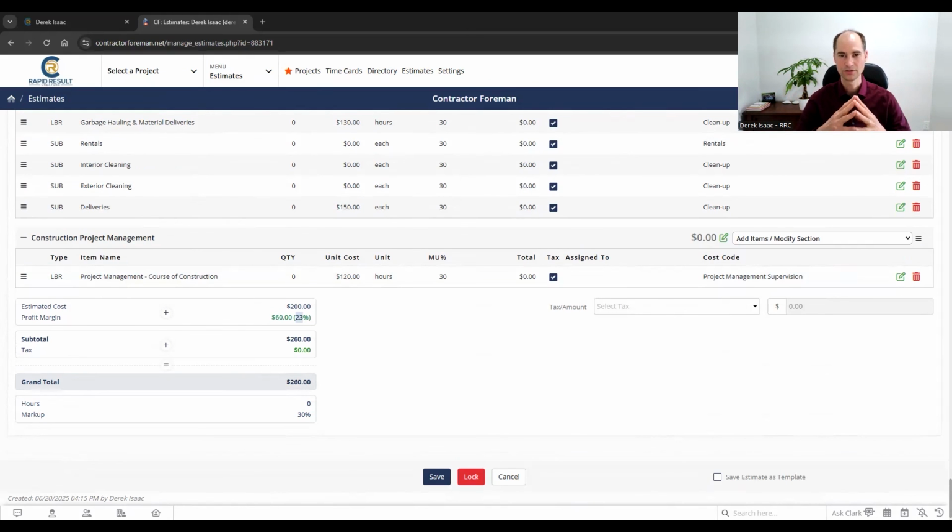Now, you need to go to your bookkeeping and figure out your overhead, run it over the past 12 months. What is your average overhead percentage of sales? So if you spent $15,000 on overhead and you made $1 million, then no, I'm off by a factor of 10 there. So if you spent, let's say, $150,000 on overhead, so this could be your admin, your insurance, all those different overhead costs, that would be 15% of $1 million. If you did $1 million in revenue, and I'm just keeping the numbers as simple as possible here, that would be 15% overhead.